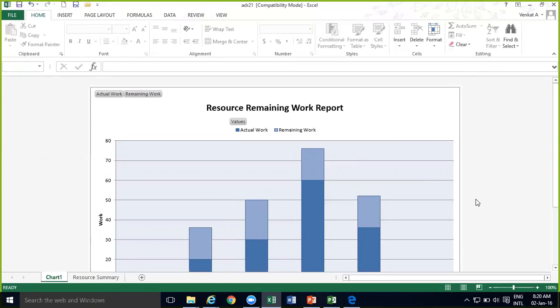I mean, the report will be for sending to other people. The report will be for your weekly status reporting and all. You can use this report directly. But for your tracking, it's mainly those columns. You basically go to tracking and check what is the baseline start and baseline finish and actual start, actual finish, where they are, right? And you can keep on putting some milestones for certain tasks and put a deadline for those milestones, and that way you can see whether you are meeting that deadline or not. So that's the best way to track.